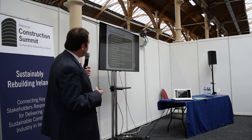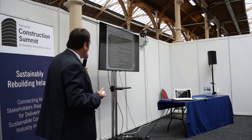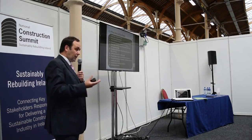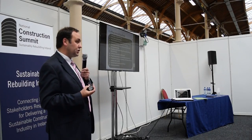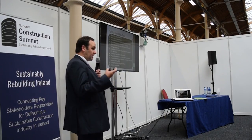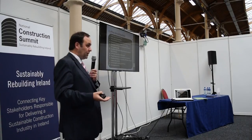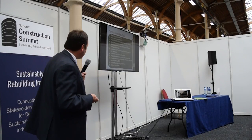The commissioning plan itself has an overview and again is quite live. You will start the process right at the design stage, and the key part from the owner is to make sure that they have all the contractors, the design team, the contractor at tender stage, and all the subcontractors signed up so that they will form part of the commissioning plan.